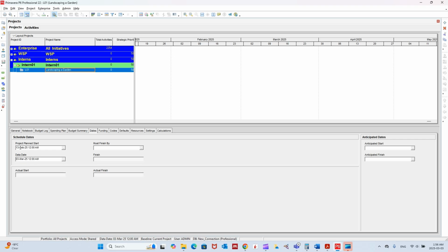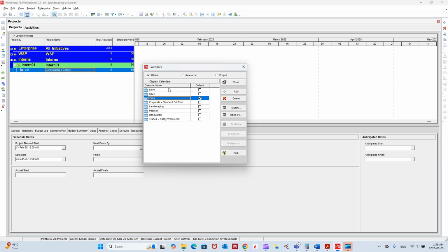We selected it to be February 13th, but when we selected it, the time wasn't showing. Now it tells you it will start February 13th at 12 a.m. Now you need to go and check your calendar to make sure that the start time will be 12 a.m., which it will not, because we have 8 hours a day. So I think we start from 8 or 9 a.m.